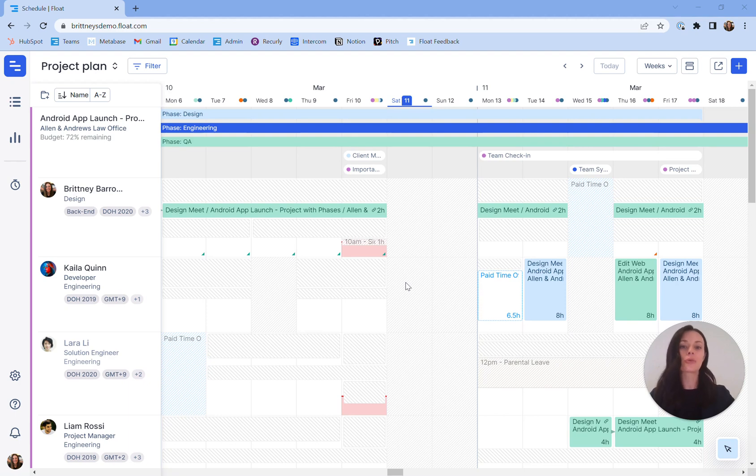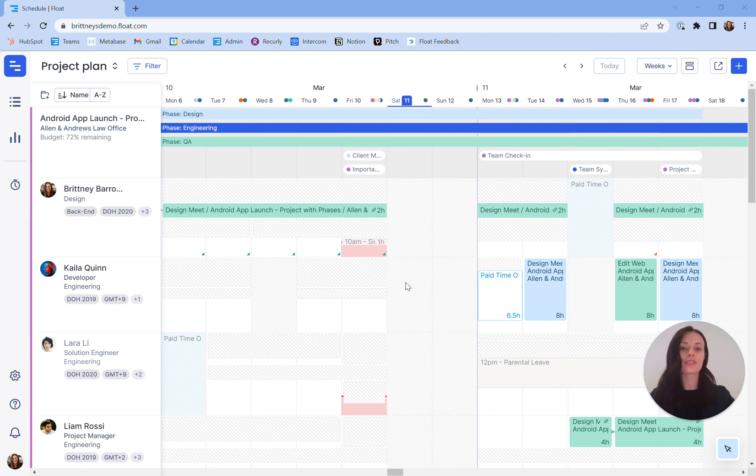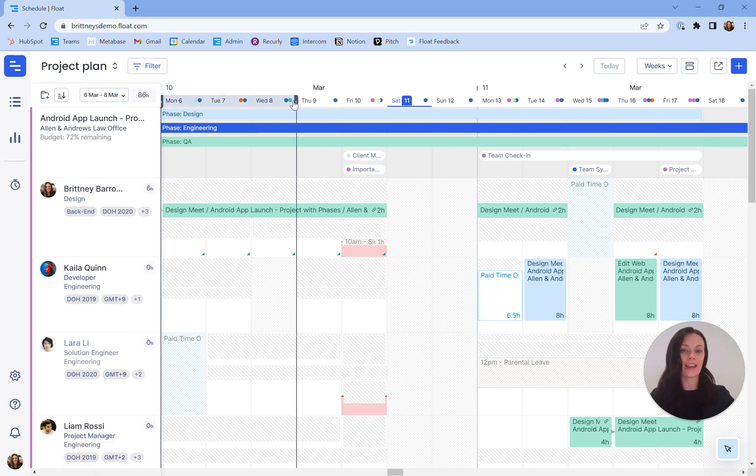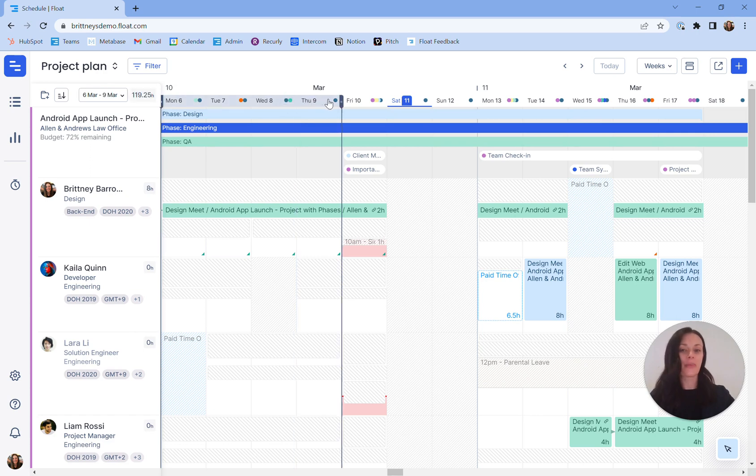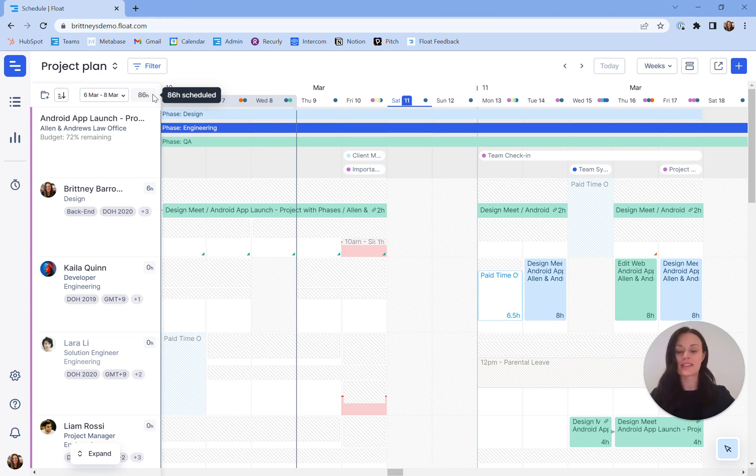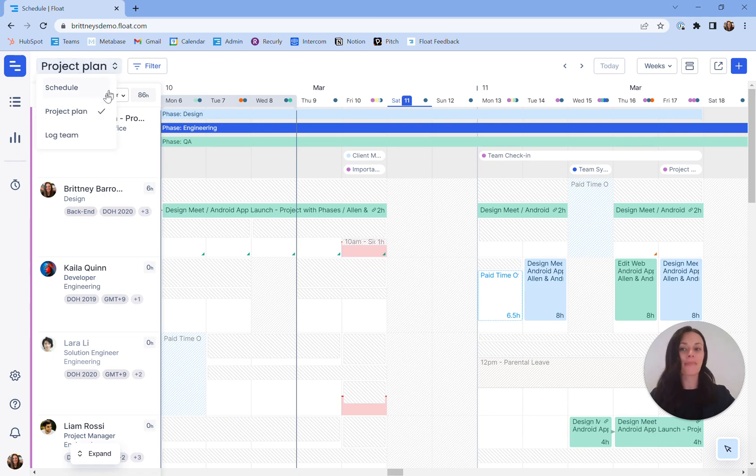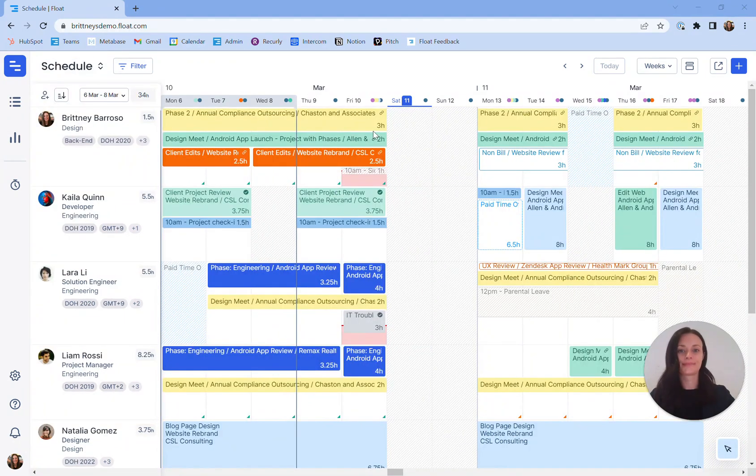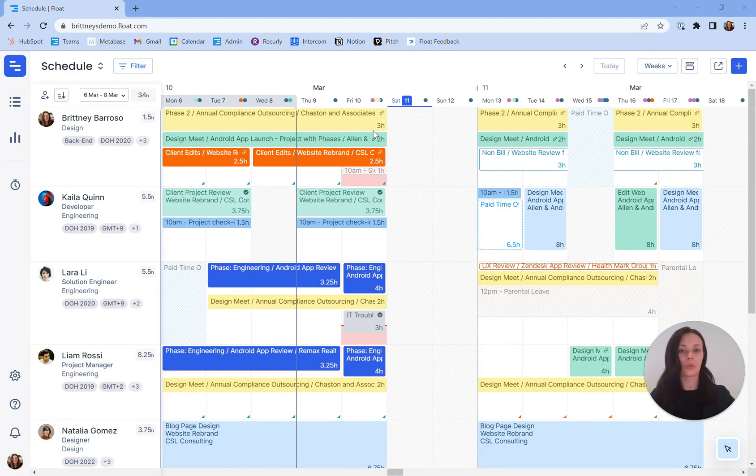You have real-time quick data analytics available to you to sort through your project workloads. To do this you'll want to aggregate your schedule or project plan data using what we call the loop. You can initiate the loop by dragging and dropping across any specified date range that you'd like to choose. You can adjust the loop by expanding or contracting it further. You'll see that analytics populate here indicating the hours of work that are scheduled on a specific project and you can jump back to your schedule to view the cumulative workload of your team.